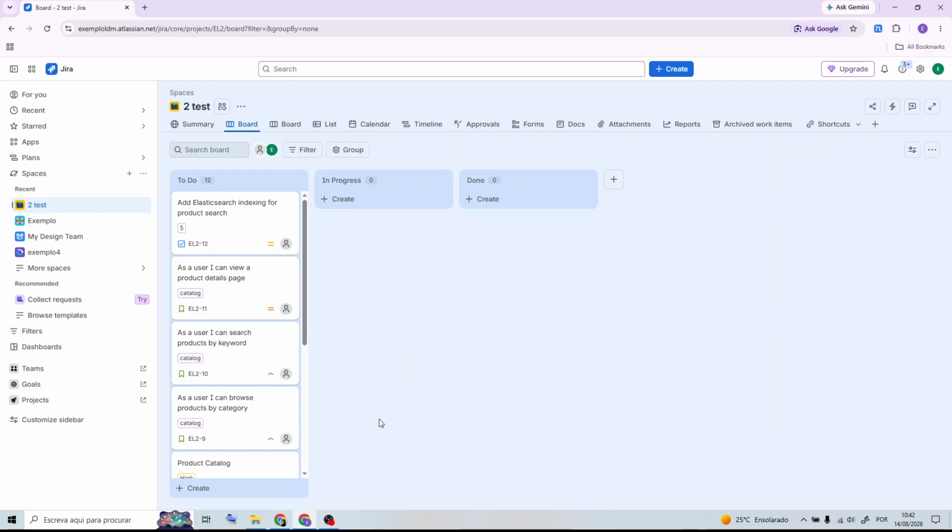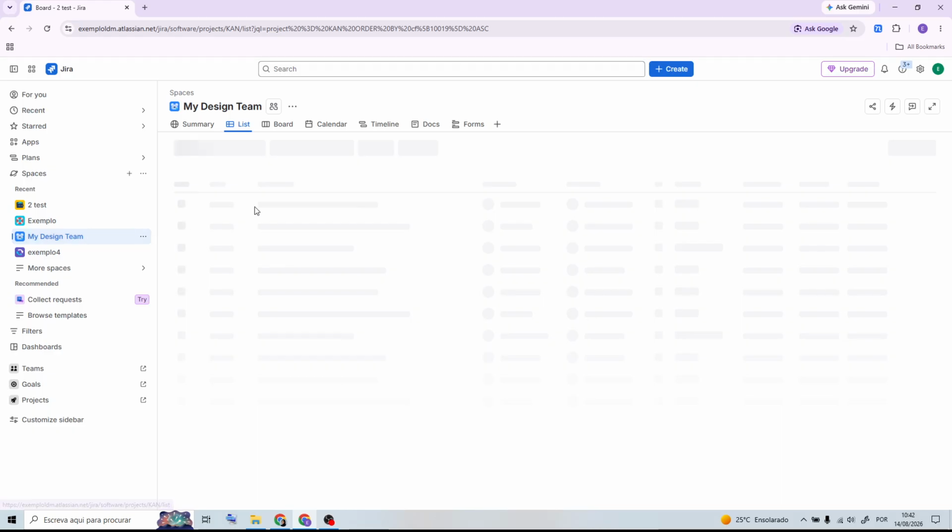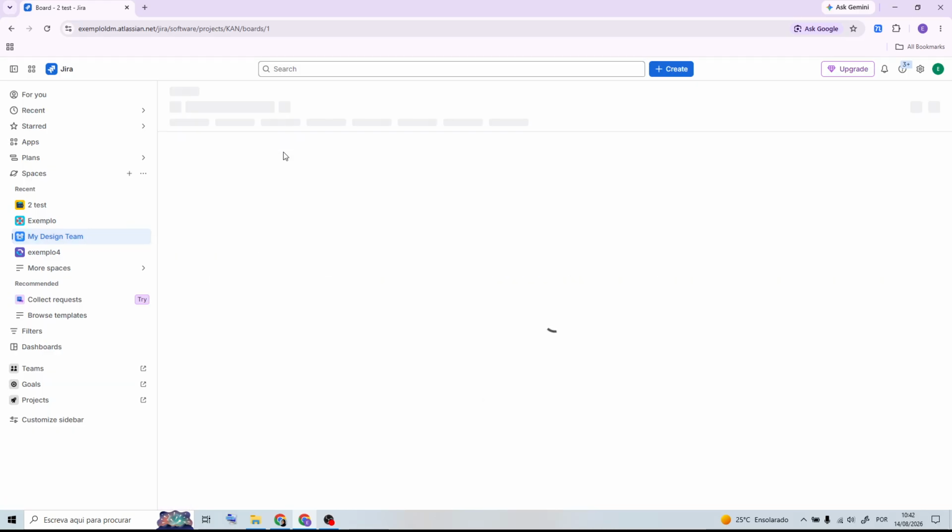In this video, I'll show you how to set up a Scrum board in Jira. First, log into Jira and open the project you want to use. Next, go to Boards and select Create Board. Now choose Scrum as the board type.